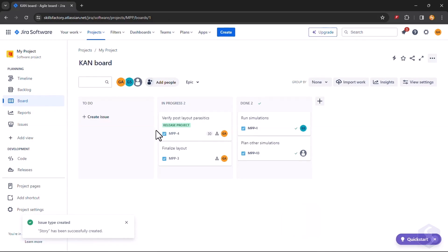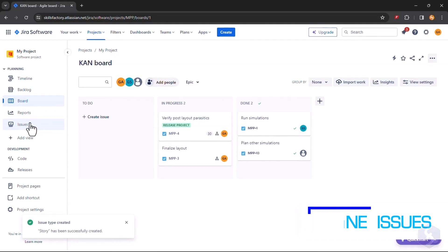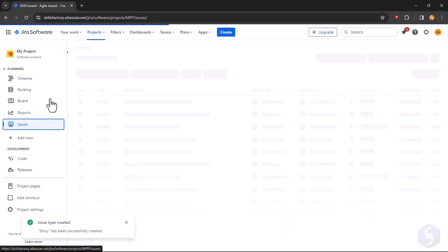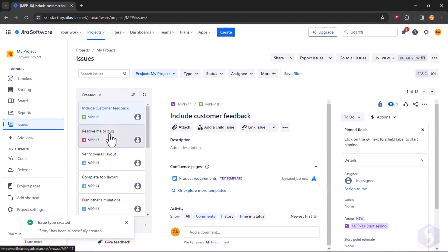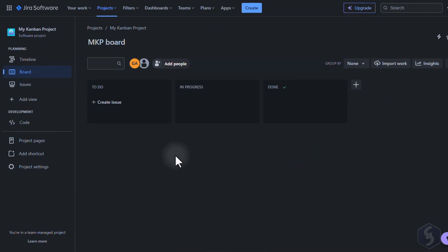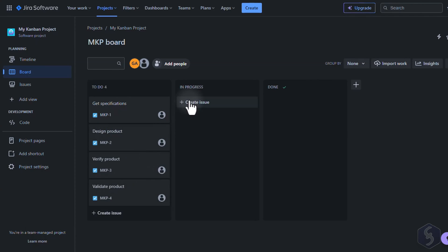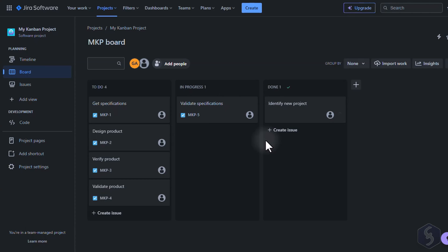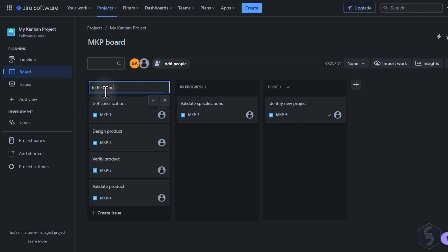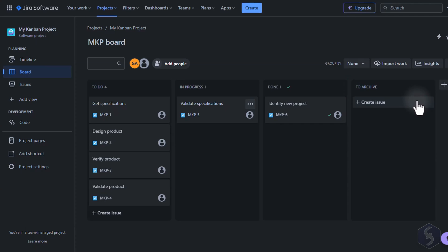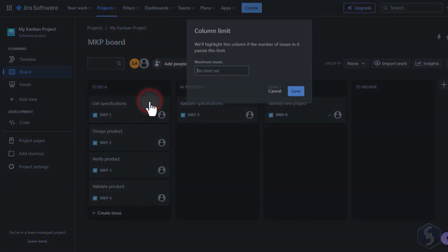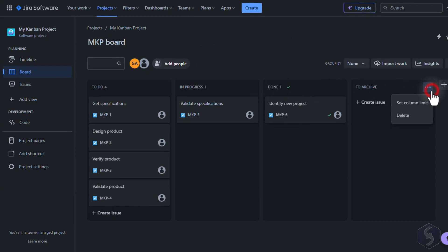A Jira project is made by several issues which can be items, tasks or bugs that need tracking and control. Create any by typing under the To Do column and apply with the Enter key. You can add others under the In Progress or Done columns depending on the current issue status. You can customize any status by clicking on its title and use the plus button to add others. You can also set a maximum limit of issues for each status and delete any if needed.